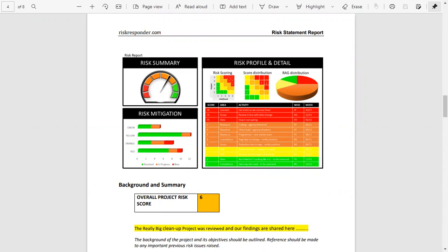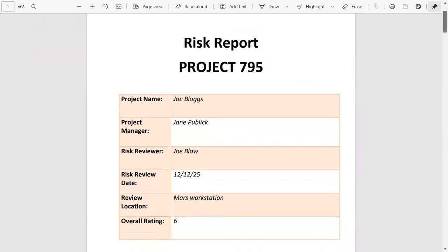And as you see there, there's an 85% chance of costing 2.45 million or less. Okay, let's say the budget, whatever the budget target is, 2.2. Well, at this point, it looks like we're definitely going to be over 2.2. So it's a higher level thinking, you see. And that's why we say the risk report is going to be updated all throughout the project. It's not a one-time thing.